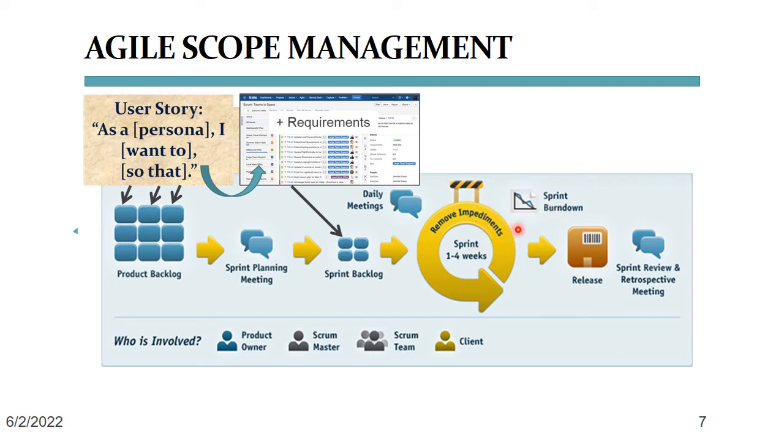Here, the team demonstrates the work from the iteration. If the participants in the sprint review meeting agree that a user story is done, it is archived. If they agree that it is not yet done, it goes into one of the upcoming sprints.